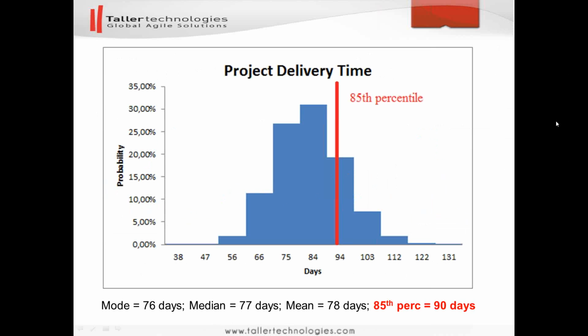So again, if the team structure is changed, or the development process used is changed, or the technology being used is changed, or the client is a different client, we should find a new baseline project in order to predict our future projects, right? It's really context specific, and it is in line with what has been part of the Kanban method from the beginning, this context awareness. As we say, context is everything. Okay. Hope it answered your question.